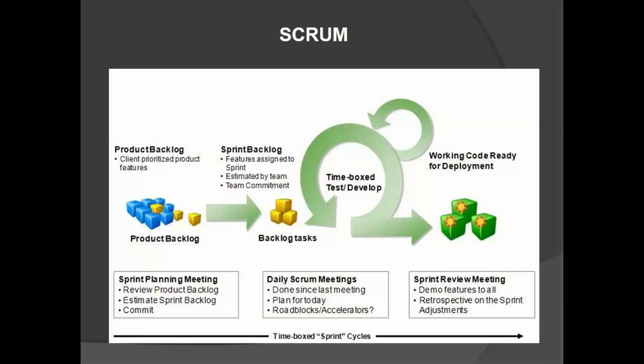Then third one is Scrum meetings. These Scrum meetings we are going to have every day for 15 minutes. In these 15 minutes, we are going to discuss 3 points. What are those? What you have done in the last scrum. Second one is, have you faced any problems or obstacles? And third one is what you are going to do in the next scrum. So in these 15 minutes, we are going to discuss only these 3 things.